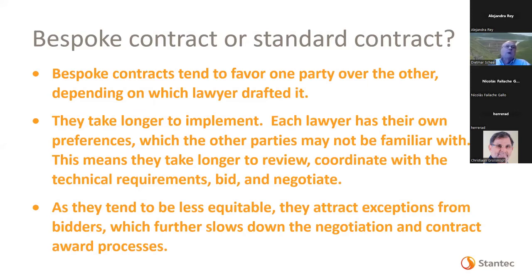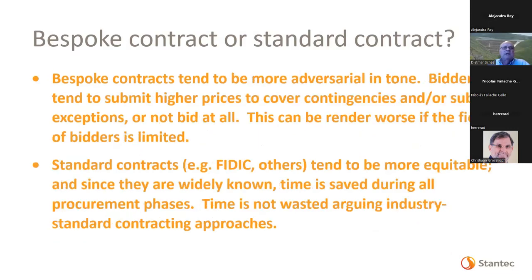When you use bespoke contracts, the lawyers get involved. And again, that slows down the process. And nobody wants to lose money on a project. So they may give you a bid, and even if you disallow any exceptions to the bid, they may put them in there anyhow, figuring, well, if you're not going to buy it, we don't want your contract anyhow. And that just complicates things, complicates bid evaluations.